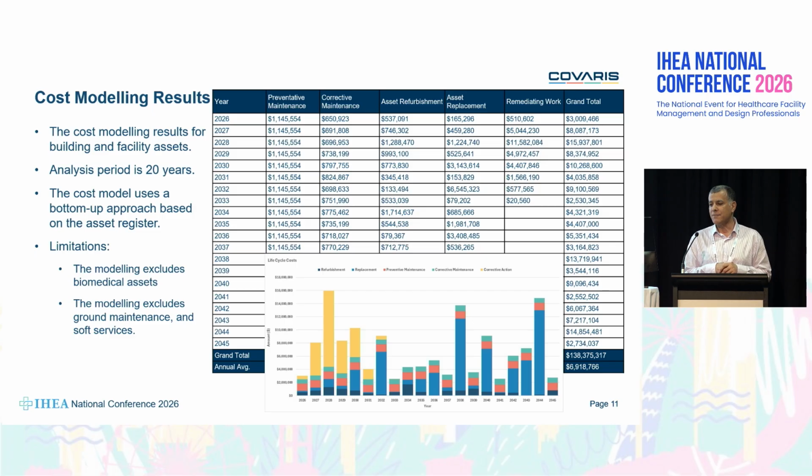That would give you, okay, if we want that particular building to go up to 2040, we ran the model to 2045, so that gives 25 years. And those yellow bars in the tens of millions earlier, those are all the issues identified. For example, for ICT, the project would cost $5 million. If we're not knocking down the building in 2030 and getting a new hospital, then we have to spend that money. So basically, that would give us as accurate a figure as possible.